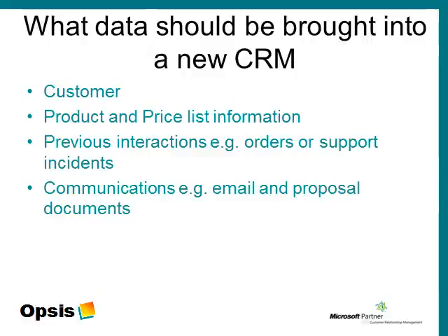When considering how and when this should be brought into CRM, there are a few things that must be considered. These are the current form that it is in and how it will be converted to match the structure that CRM will need it in, which is often very different to the format of the current system, even if they are both in the same sort of database. How often does the data get updated? This is important because it affects when the data can be extracted from the legacy system. And how important is the data moving forward? This is important because decisions need to be taken about the value of the data against the effort of bringing it in.